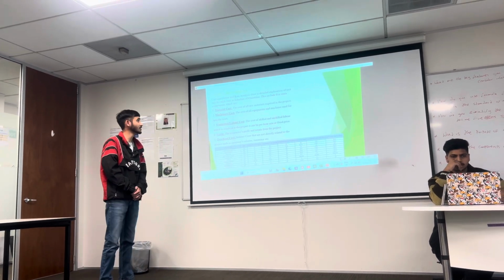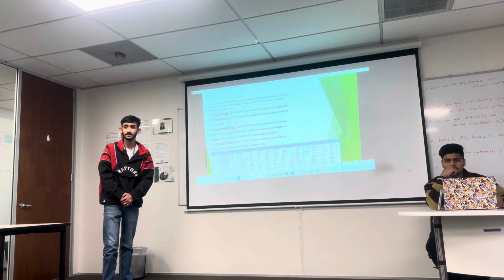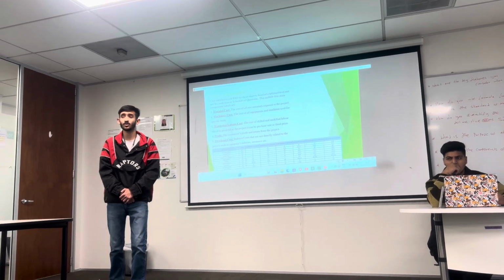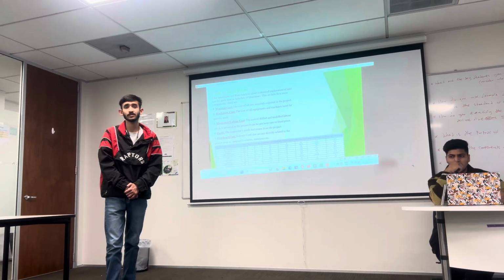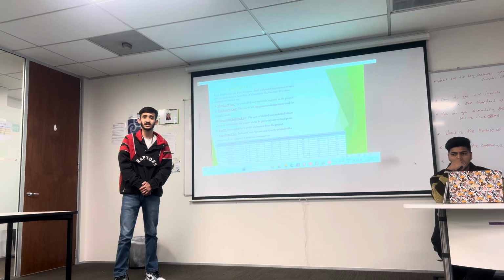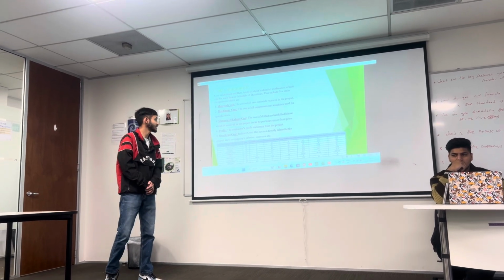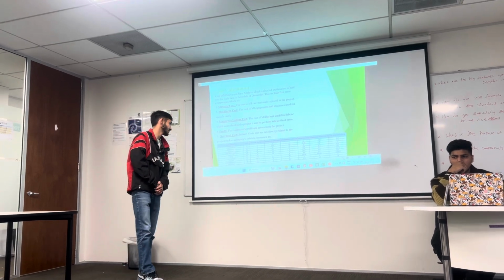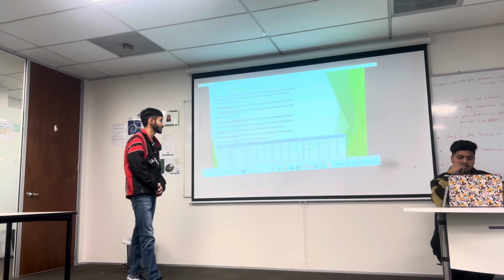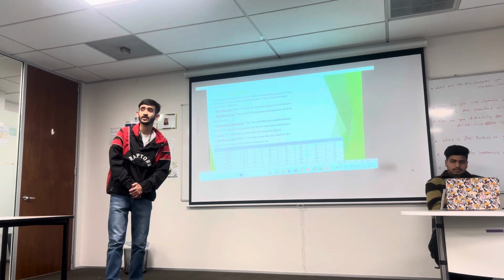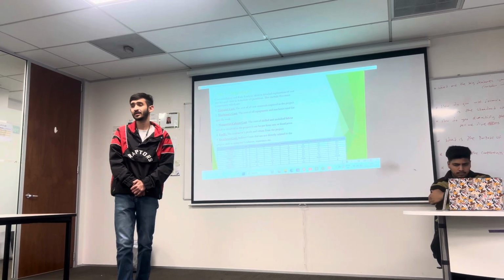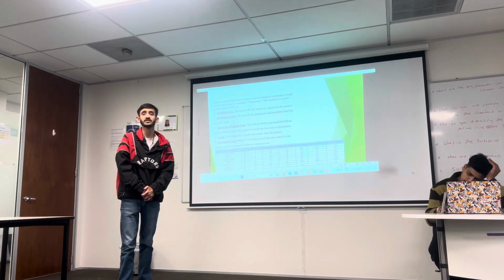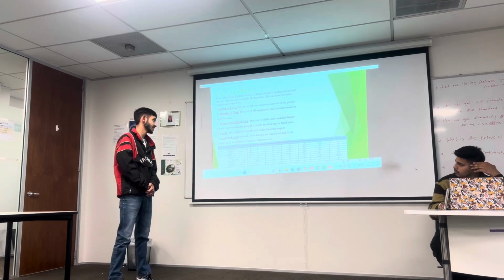Material costs are the costs of all raw materials required in the project. Machinery cost is the cost of all equipment and machines. The labor cost is the cost of the manpower or the labor. It can be a per hour rate or a fixed price. Then profit. Profit is the contractor's profit or the return from the project. And then there is the overhead cost. Overhead costs are those costs which are not directly related to the work, those are indirectly related to the cost, such as the company's salaries, wages, or the temporary services required on the project, and insurance, etc.